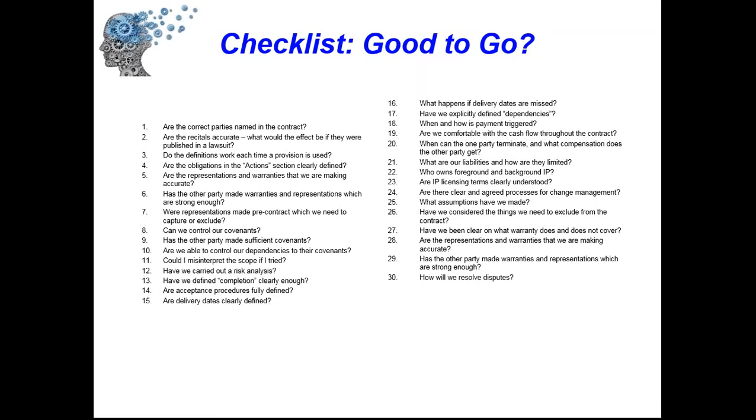Understanding number 27, what a warranty does and does not cover. Does the customer have to return an item under warranty, or does the supplier come and collect it? We have a client who puts items 2 miles under the sea. If things go wrong, is the supplier supposed to go down and collect them, or does the customer have to retrieve the item and return it?